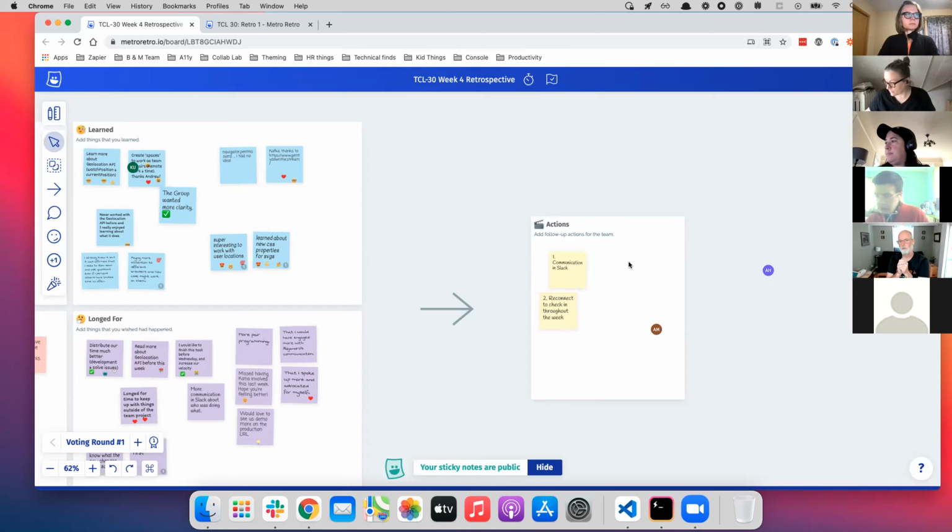So if you already have a couple of PRs in review, instead of doing new work and creating new PRs, we should all think about how we get those PRs done. And don't lose track of the work. If there's something new, a new feature or a bug you want to fix, make sure that's tracked on the board. But the first priority should be getting things into the done column. That's always the first priority for all the work, because one thing done is way better than 2 things that are 80% done.